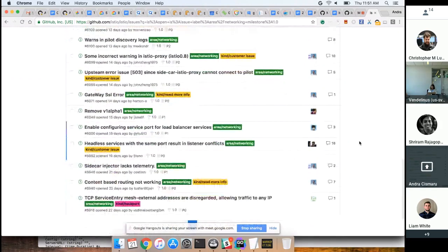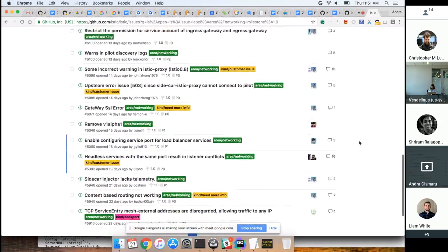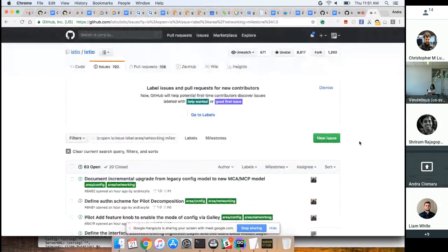So we'll get better at the triaging process so that we know that bugs have been triaged. One of the goals of triage, obviously, is to assign bugs. Usually, you have some kind of automated system that, when bugs come in, round robins the bugs among the available people in a particular area. They'll do the initial round of triage. They'll either pick a better assignee, or they'll remove themselves completely, or they'll keep the bug. And that's the first phase.